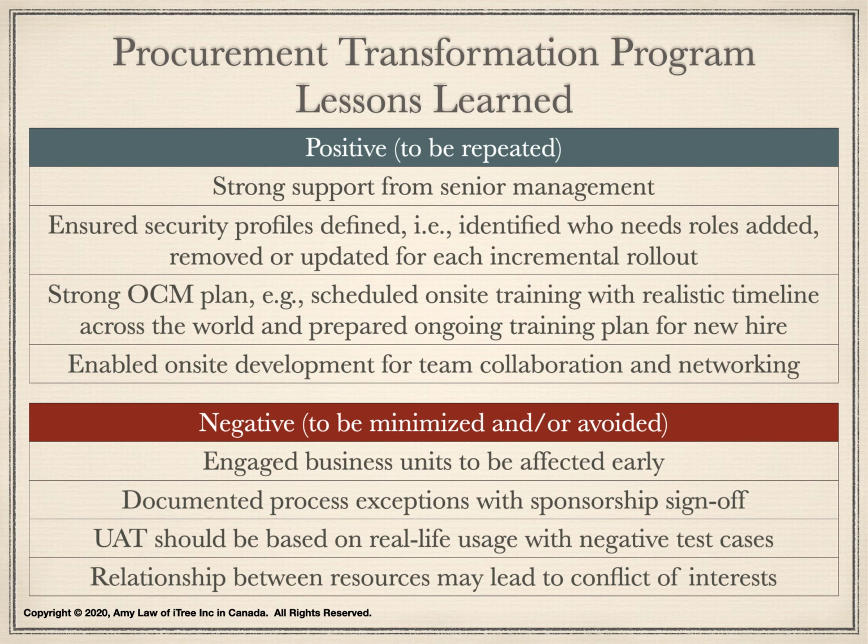We should have documented process exceptions and criteria with sponsorship sign-off. Some of the process exceptions were not identified, and so they were not programmed into the SAP system. Some of the exceptions were not approved in a timely fashion, and so they didn't make it to the cutoff. Therefore, we had to manually handle some of these exceptions until we were able to update the SAP system with a scheduled patch. A better way to improve this situation is to allow sufficient time to identify all exceptions and allot enough time for sponsorship sign-off.